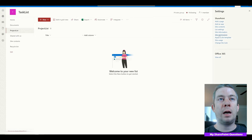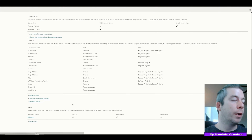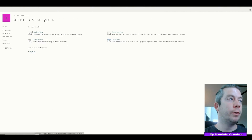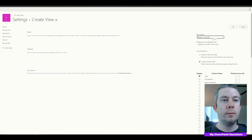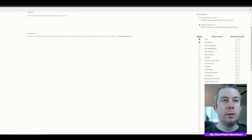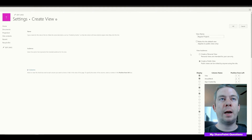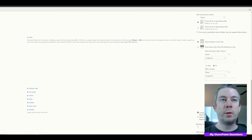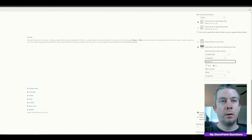Now let's add these columns to our views. When we create a new view, we'll go to Create View, start from the existing All Items view, which brings in the Title. We'll name this Regular Projects and bring in: Actual Work, Benefits, Assumptions, Deliverables, Project Phase, Project Status, and Work. Then on the filter, we'll set it so the content type is equal to Regular Projects.